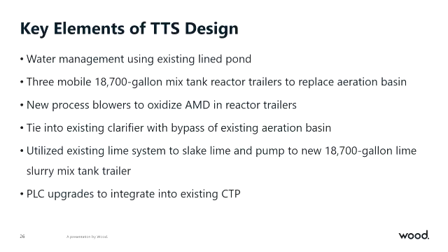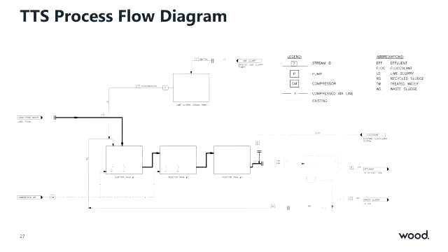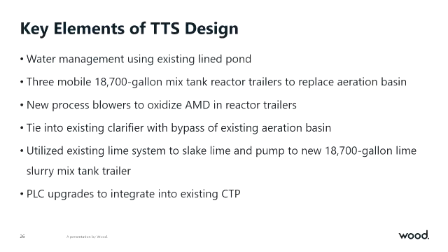I'll jump back real quick. And then we brought out 3 mixed tanks on trailers, so mobile tanks that we were able to bring out and then essentially just simulate what the aeration basin was doing, but more efficiently, given that they're designed with updated mixers.